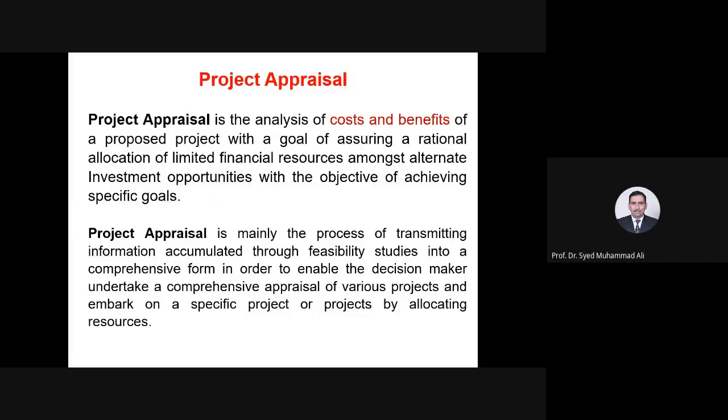So appraisal is a very critical process of evaluation. It's very important, and it happens for all public spending money. There is a formal process of appraisal, in which a lot of things are checked. If you pick up the PC1, the older version had 15 serial numbers, parameters against which the person preparing the PC1 has to give information.